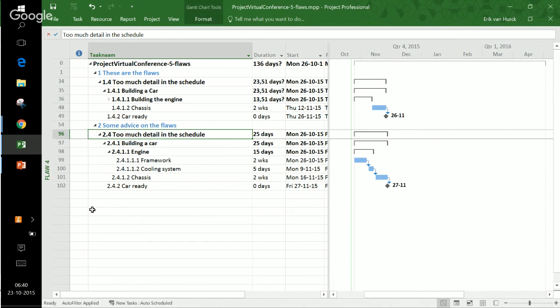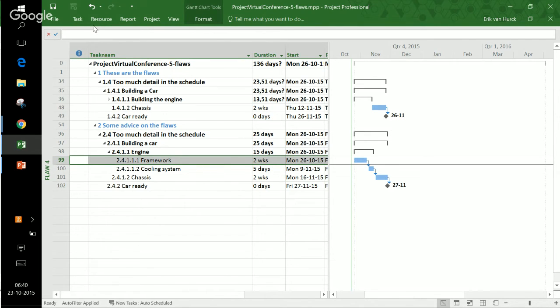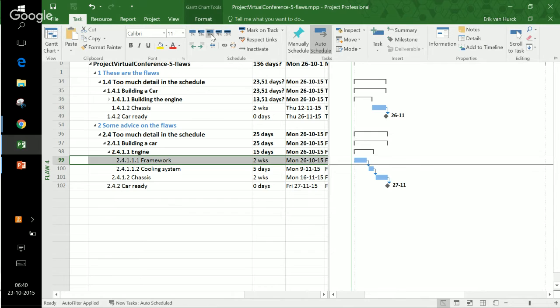Have a look at the complete duration of your schedule or your project. If a project takes you half a year, well, then maybe you want to have a meeting every 2 weeks to see what's happening. In the earliest example, well, maybe 20 things happened and you need to tick them all to be completed. Or in the ideal situation, you'll just have this one task and you'll say, this is 50% done.